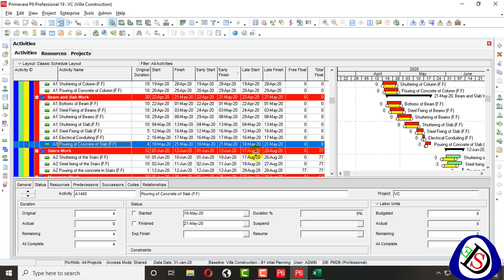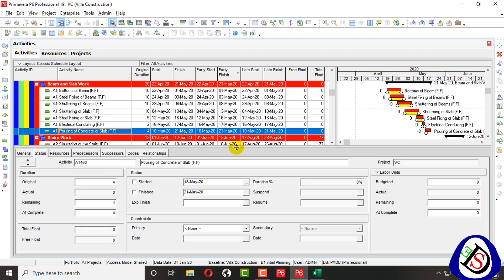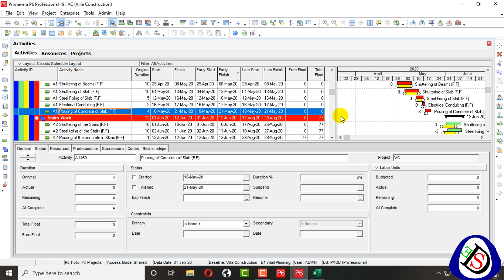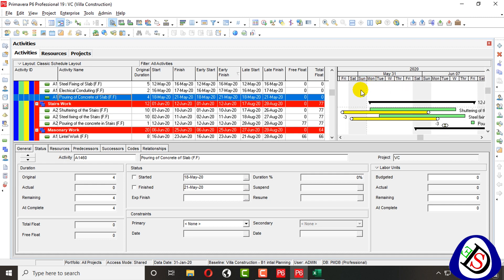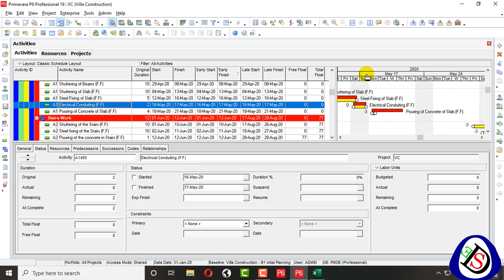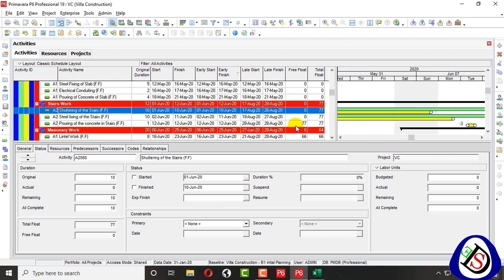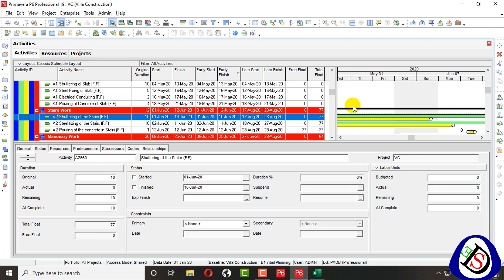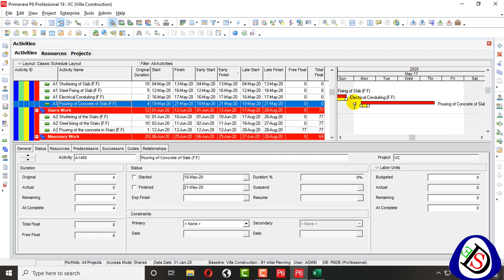I find an activity called Slab Pouring — it looks like a critical activity with zero float and zero free float. I push this activity up a little so I can see everything clearly. This is 'Pouring of Concrete.' I enlarge the view, go to the front of this boring slab, and double-click so I can find my bar. I can see a minus three days delay or variance in this activity.